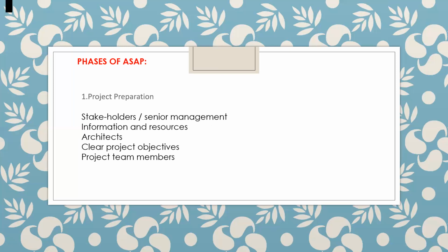After that, your senior management leads module-wise will capture what all the resources are and what technology is behind it. So the basis team and different teams will be there. A system architect is different from an SAP functional architect and a technical architect. What kind of architects do we want? There should be clear project objectives, like this should be finished. If it starts from today, this phase needs to be finished in 6 months. I'm just giving an example. It's not that easy to frame that draft and all those things.